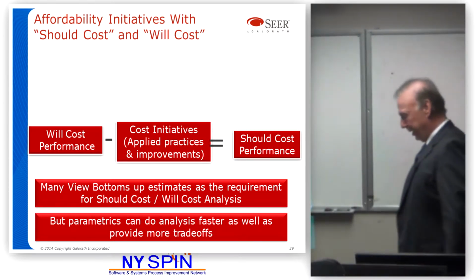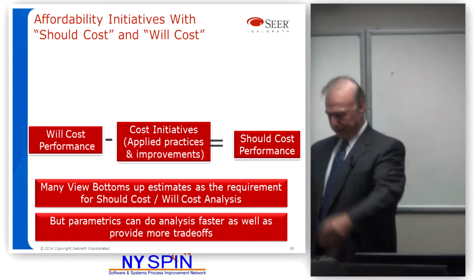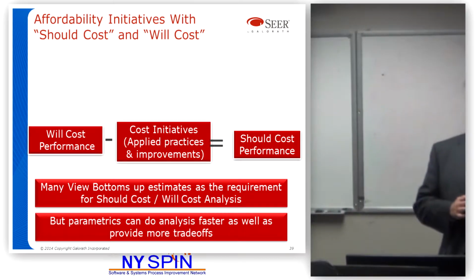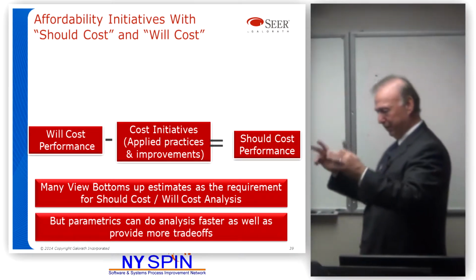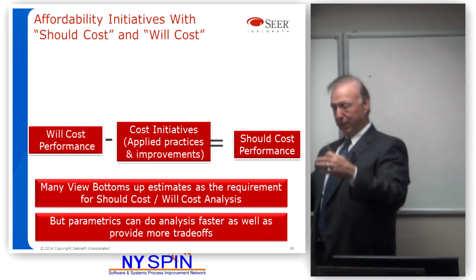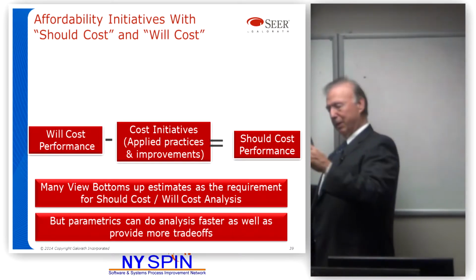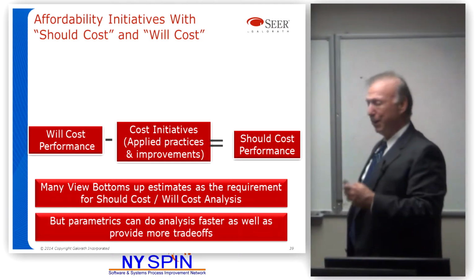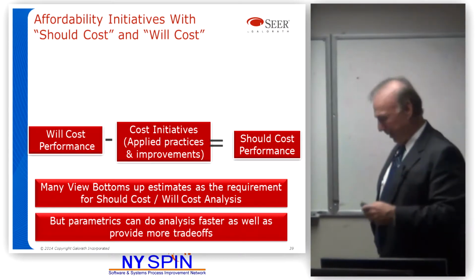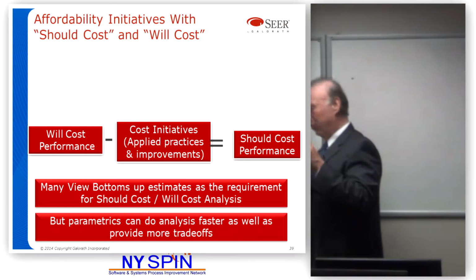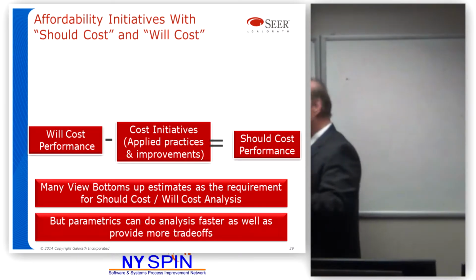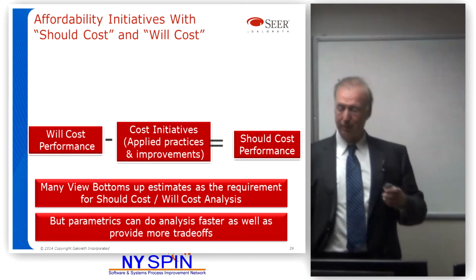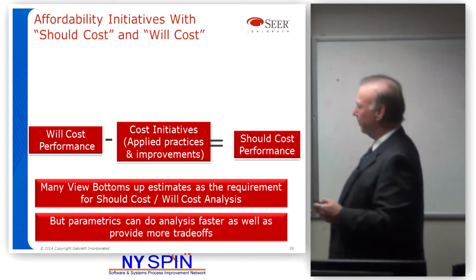What if we use the latest? We're doing a browser app. We use the latest libraries from whoever is doing the best libraries these days. We use libraries from other people instead of doing that ourselves. How much will it lower the cost? What will it be without it? What will it be with it? And you've got license agreements perhaps, and the cost can go up or down. But figuring out ways, literally not just doing the baseline, but figuring out ways to reduce costs and schedule is part of the process. It's, I believe, critical. Not just here's a solution, but what's the most viable solution?